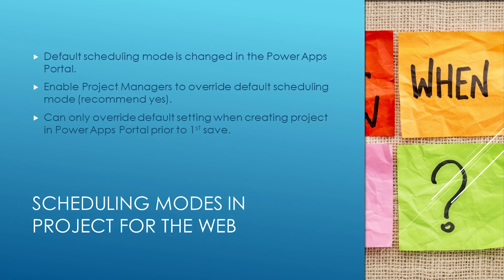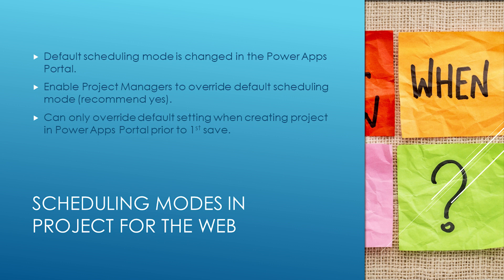Where do we change the scheduling mode? It's in the Power Project Power App portal. When you make this change, you can allow PMs to override. That's a good setting because it lets your project manager specify whatever mode they're comfortable using. The PM can only override that default setting prior to saving the project. Once it's specified, there's no changing it.